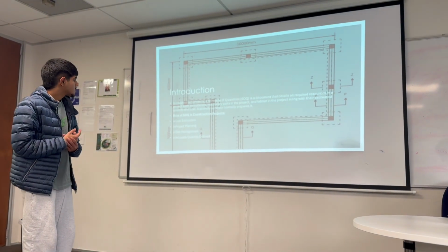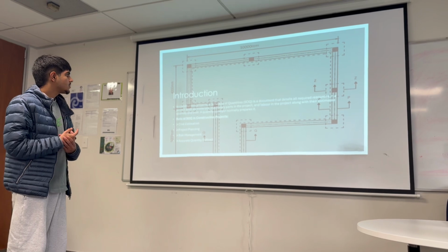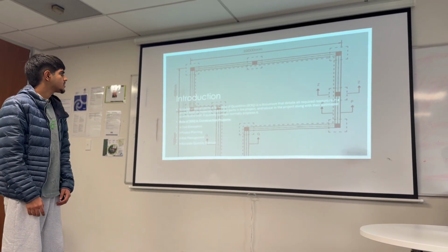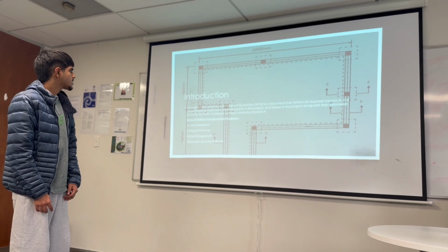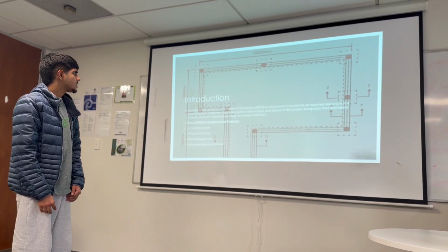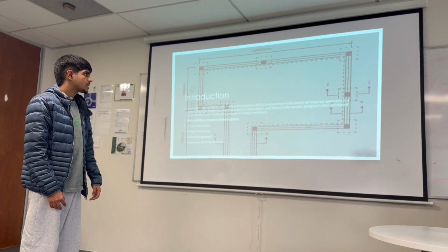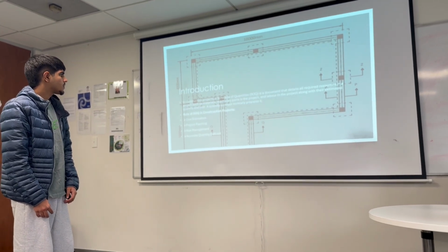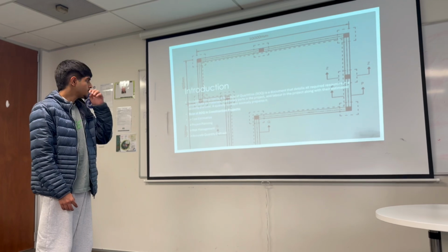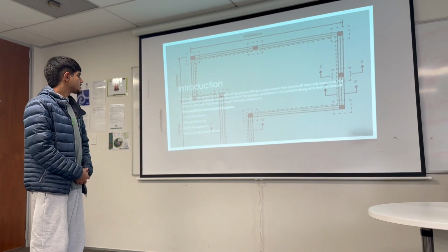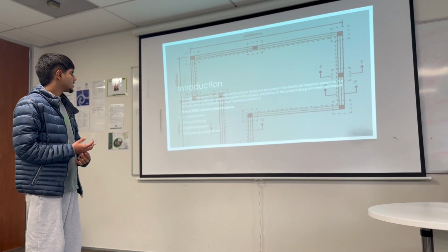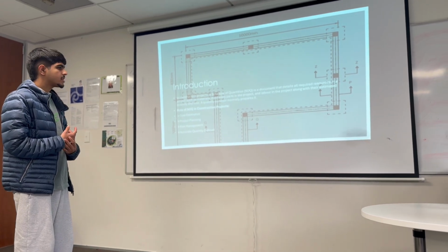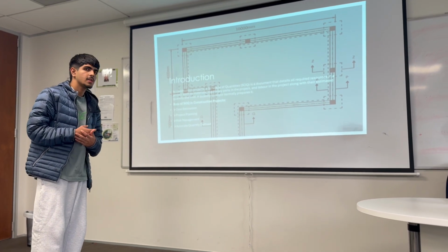Firstly, in the introduction: the schedule of quantities, SOQ, is a document that details all required resources in a project, such as material, machinery, parts and labor, along with the estimated quantity and cost. A quantity surveyor normally prepares the SOQ. The role of the SOQ in a construction project is cost estimating, project planning, risk management and accurate quantity definition, in which quantities play the main role.